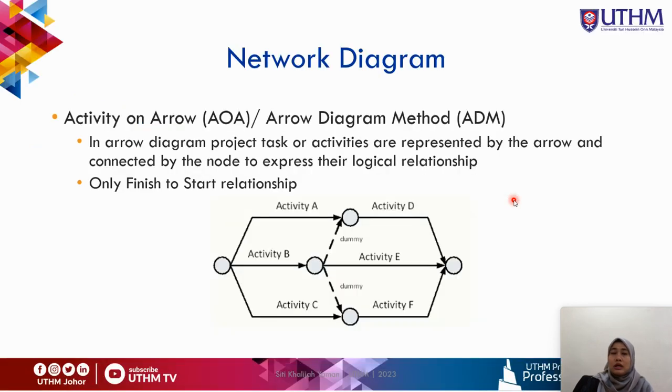Basically, the arrow diagram method, or ADM, is sometimes called by certain books activity on arrow, AOA. This is a network diagram that uses arrows to represent the tasks.